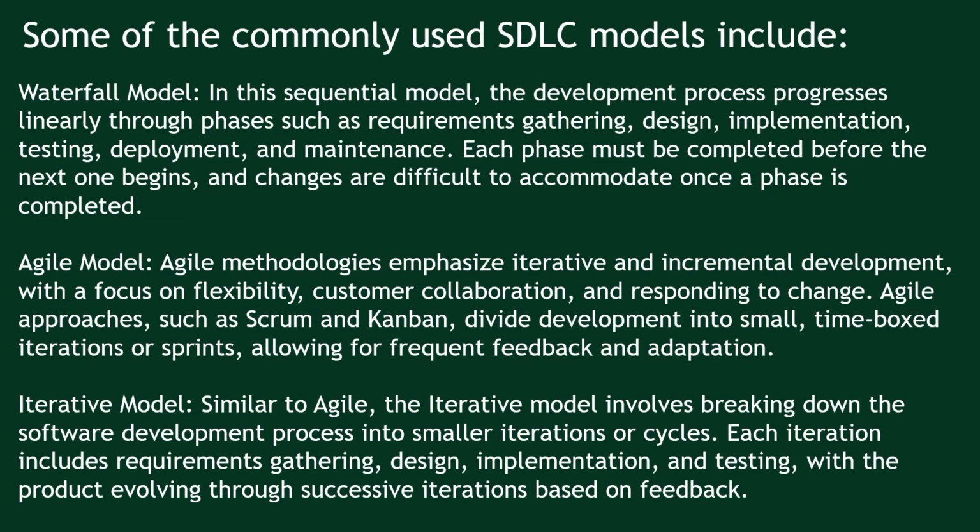Some of the commonly used SDLC models include Waterfall model. In this sequential model, the development process progresses linearly through phases such as requirements gathering, design, implementation, testing, deployment, and maintenance. Each phase must be completed before the next one begins, and changes are difficult to accommodate once a phase is completed.